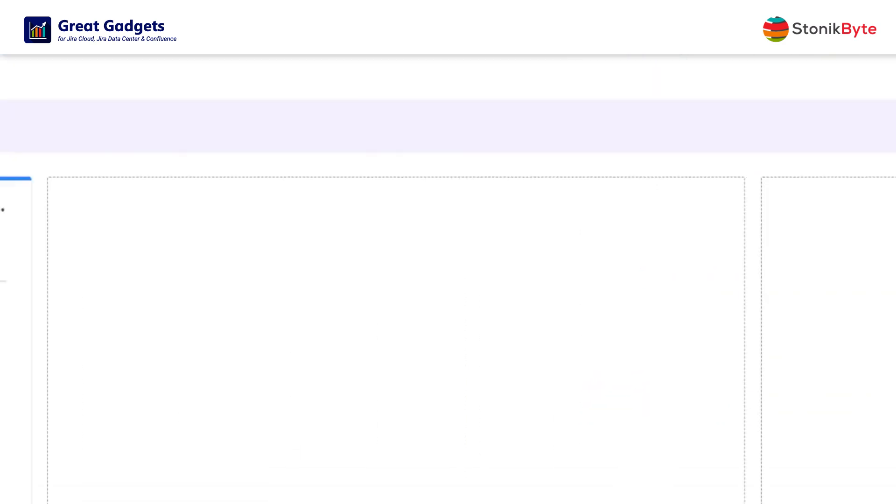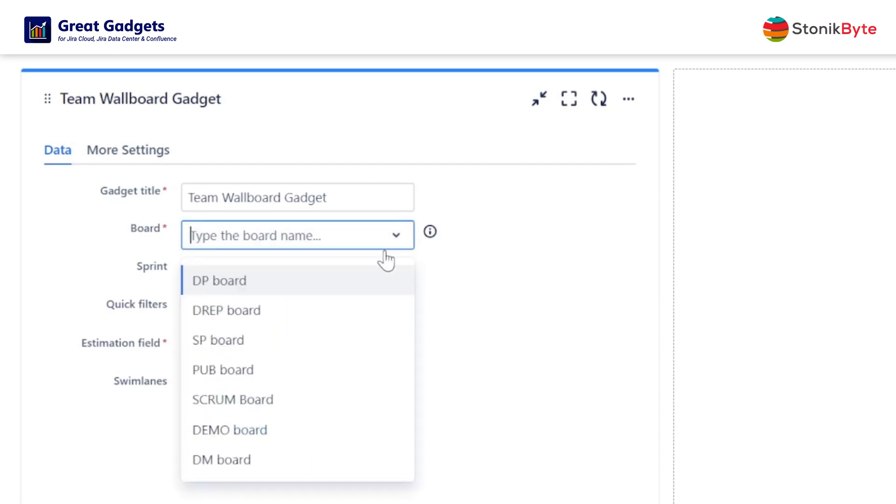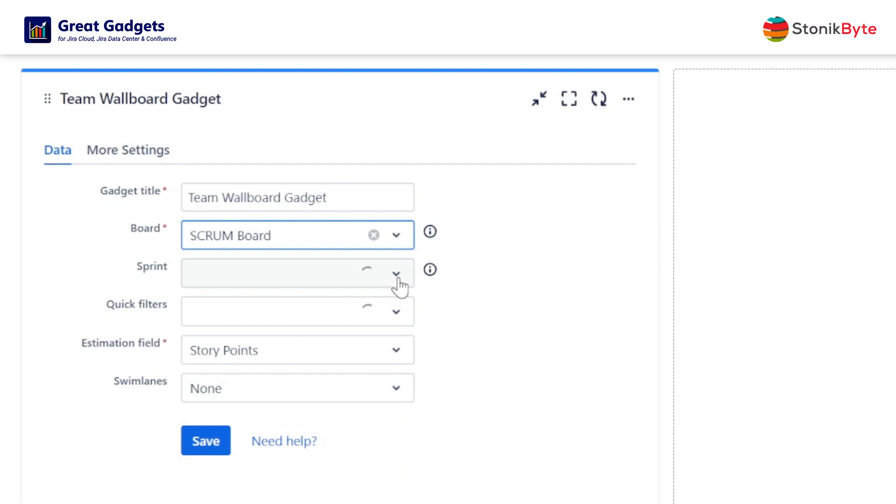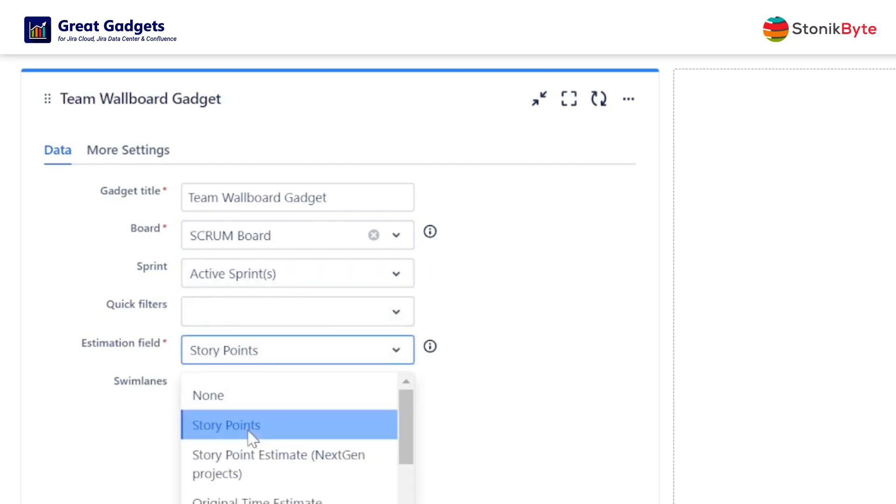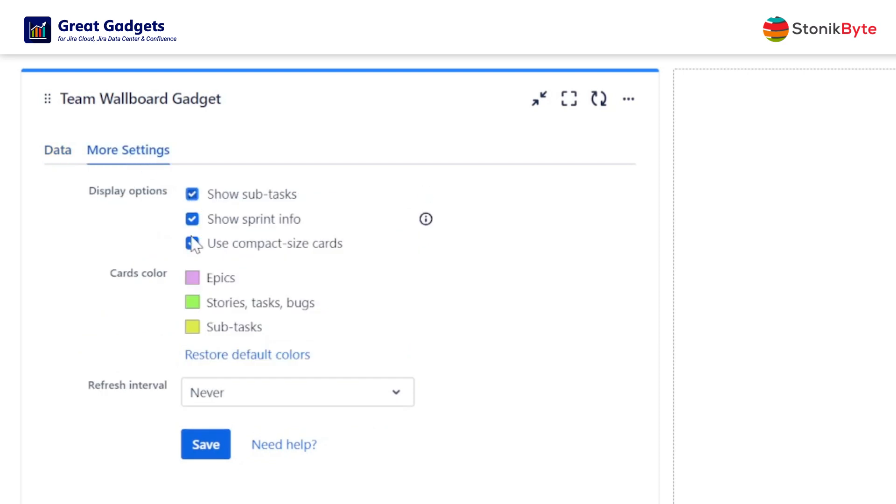Assuming that you have a Scrum team, and you want to display their work items from the current sprint in your dashboard, all you have to do is configure it to use the Scrum board of your team. Then choose the Estimation field, and check the option for displaying the subtasks.